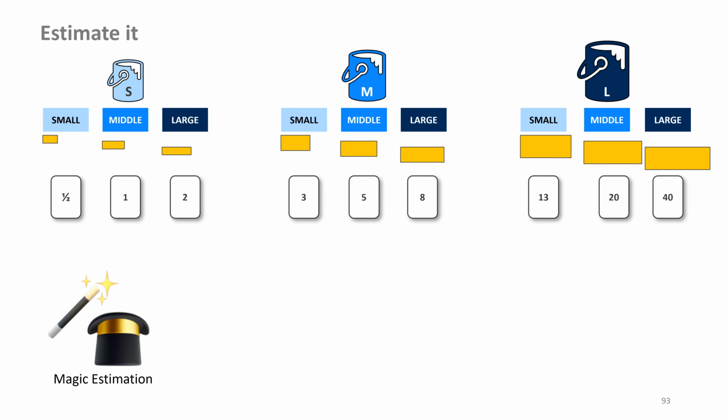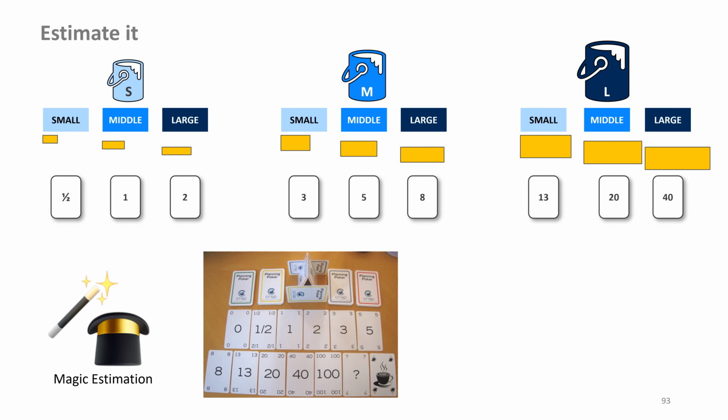After we have arranged both user stories accordingly, we compare them in relation to the ones that are already hanging there. Now we assign our numbers. The second variant is the planning poker. This is suitable for teams that have been working together for a long time. This explains why the playing cards down here in the middle don't accidentally look like they are from a game.